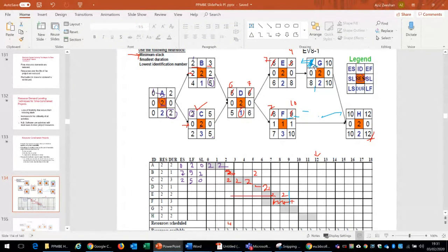Now, once you are calculating the slack, you have to see the difference, 7 take away 9, because F is already being too much delayed. F would give you a lower slack when you take into account that the new start time is 9. So F would be given preference when compared to G.